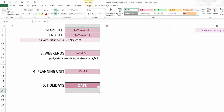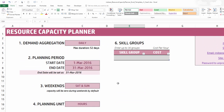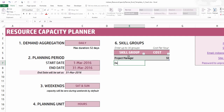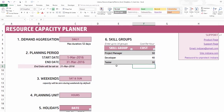For holidays, we are going to have a couple: one on the 15th of March and another on the 24th of March. I enter them in, and now we have our holidays input. The next input in the settings sheet is the skill groups — there are three different skill groups in our team: Project Manager, Developer, and Tester.